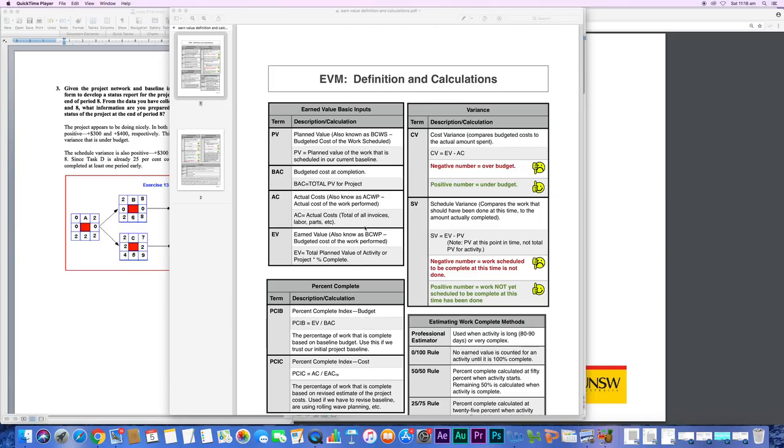So we plan how work is going to be earned at certain points of time, and we award value in terms of dollars and schedule it in a time-phased cost schedule. So that's your baseline cost schedule where we start from, and that's the place where we read our planned value. So all this data on planned value we get from the planning phase.